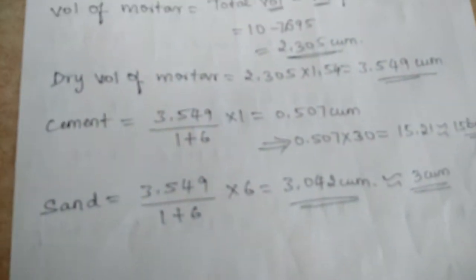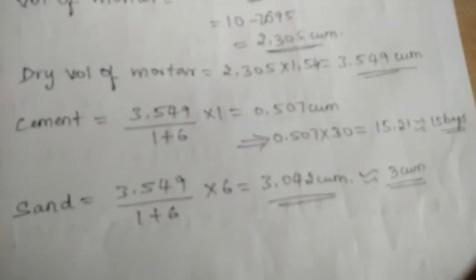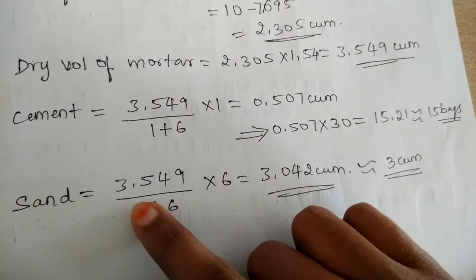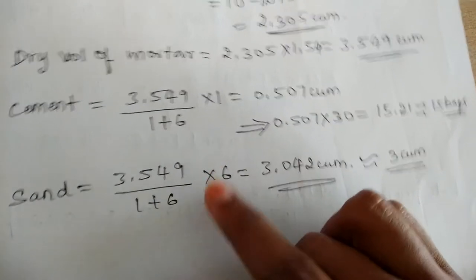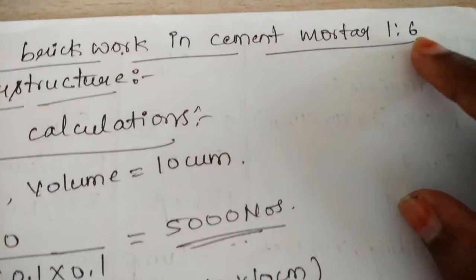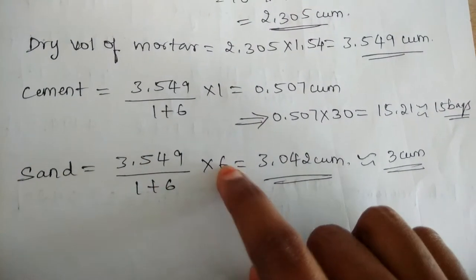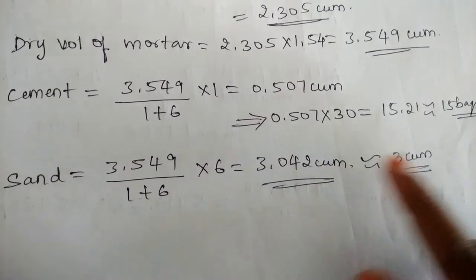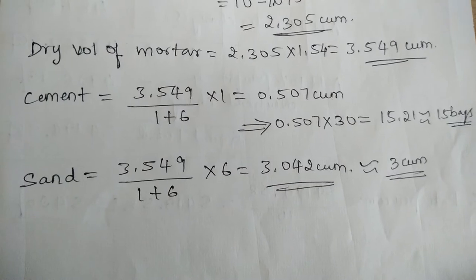Then let us find the quantity of sand. To find the quantity of sand, we take the dry volume of mortar — 3.549 — divided by the sum of the proportion, that is 1 plus 6, into the part of the sand which is 6. On simplifying, you get a value of 3.042 cubic meter, approximately 3 cubic meter. So this completes the material calculation.